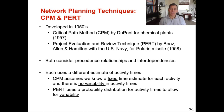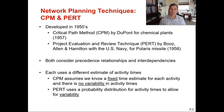There are a lot of similarities between both of these methods and a couple differences as well. The main thing that both of them review and consider is precedence relationships and how those relationships have interdependencies — essentially looking at the steps in each one of these projects and what comes one after the next. The big difference between the two is that CPM assumes we know a fixed time estimate and there is no variability in the activity times. So if we believe a project is going to take 16 weeks, we just assume it's going to take 16 weeks — a fixed time with no variability.